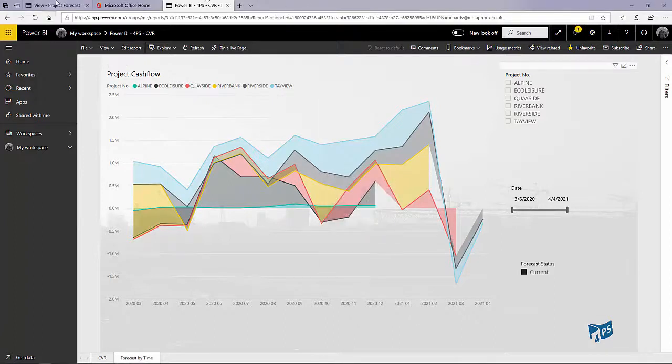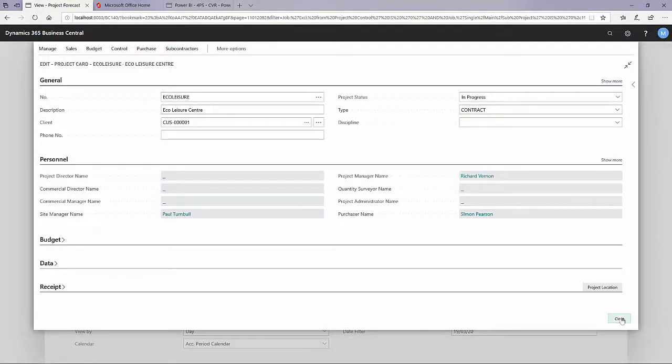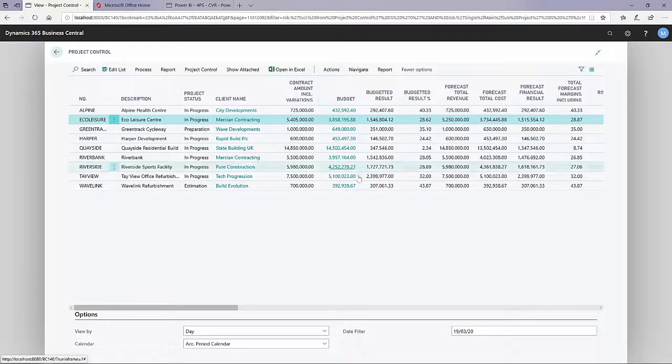Okay, so what we've got then in summary is we've seen that you can put budgets into the system in various ways. As you're spending money through the life of the project and building up your forecast to complete, you've got those figures to compare to, and you can spread those forecast figures out by individual month as well.